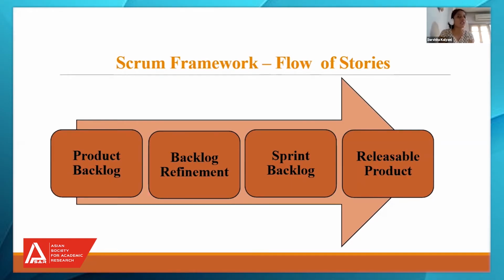Detailing of the user stories will be done, and at this stage the priorities of the user stories will be set. All the user stories cannot be implemented in 15 days in a particular sprint. So the Scrum squad, the product owner, needs to set the priorities for the stories. These stories should be implemented first in the upcoming sprint, and according to the priority set at the backlog refinement stage, the Scrum team pulls the story from backlog refinement to the sprint backlog.